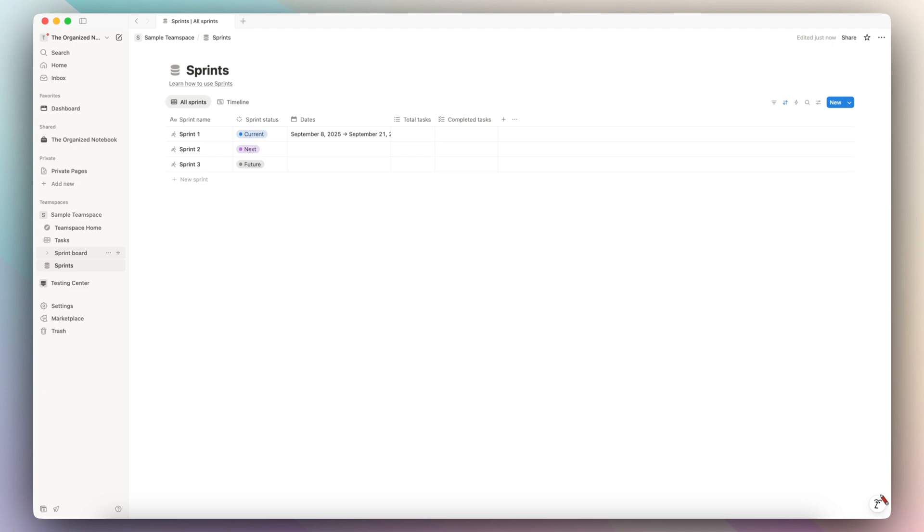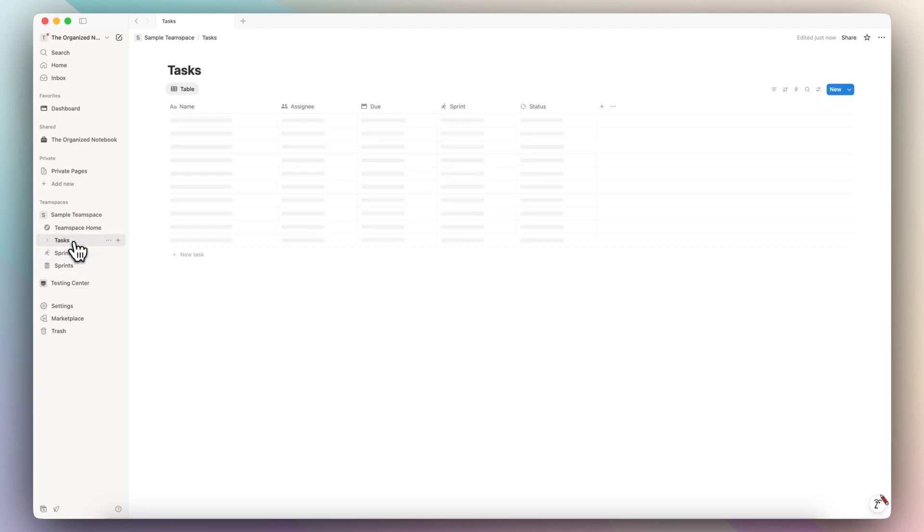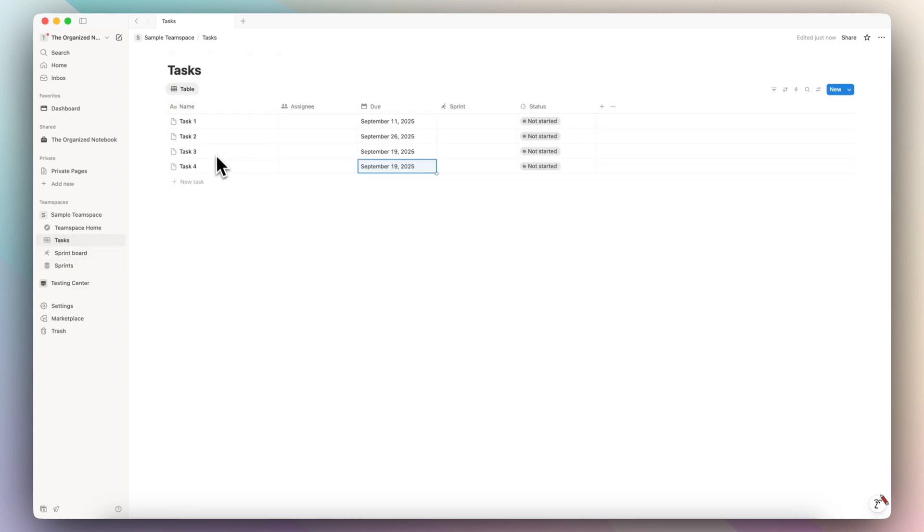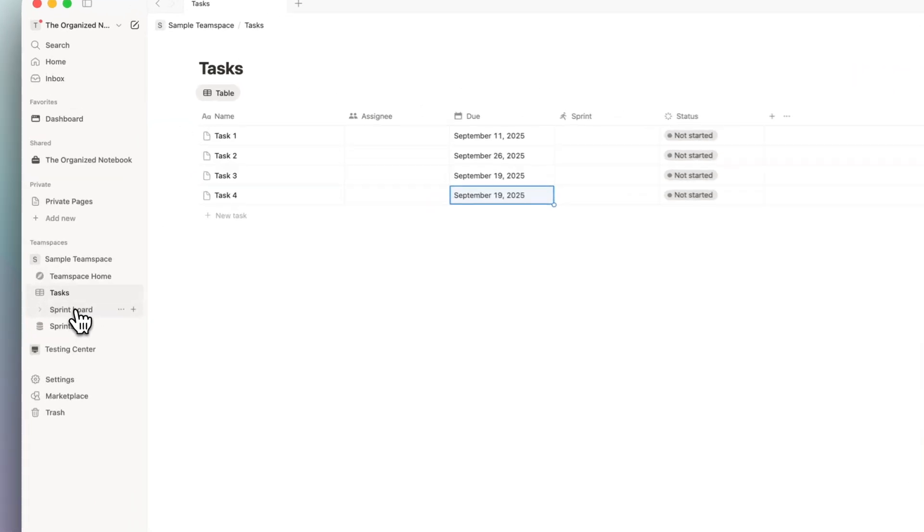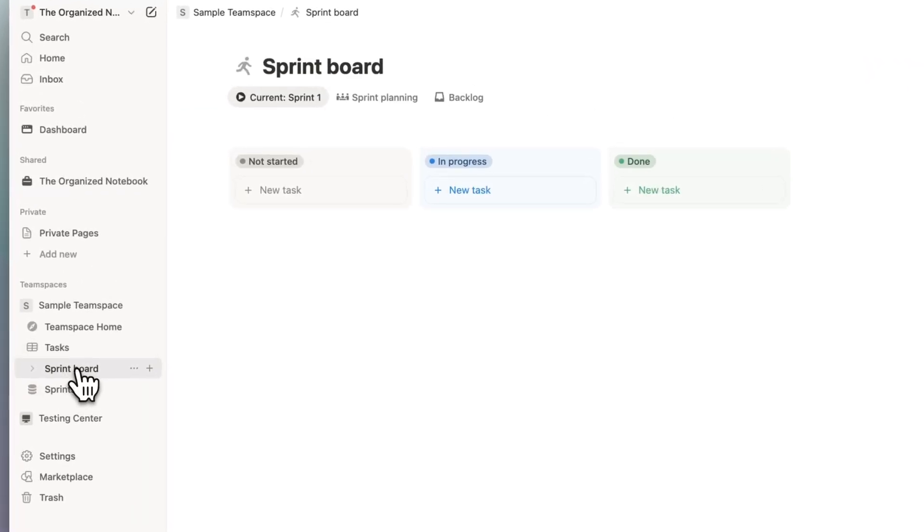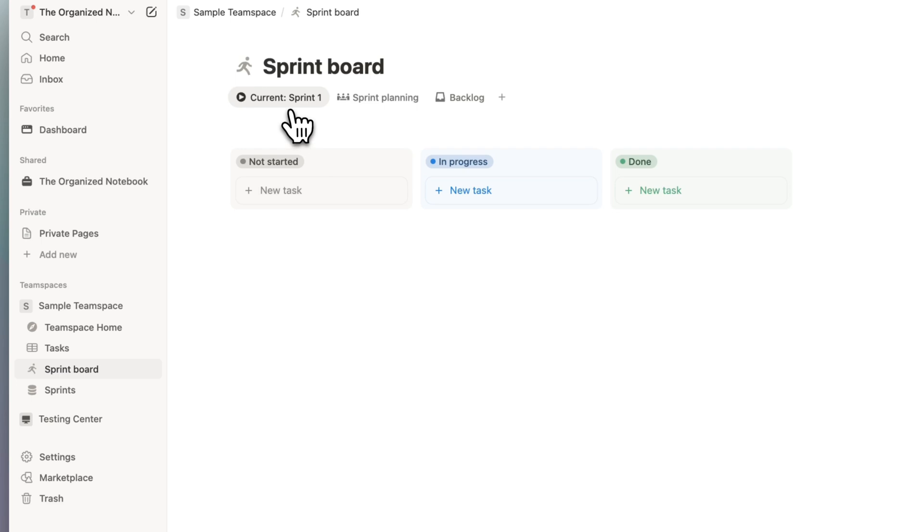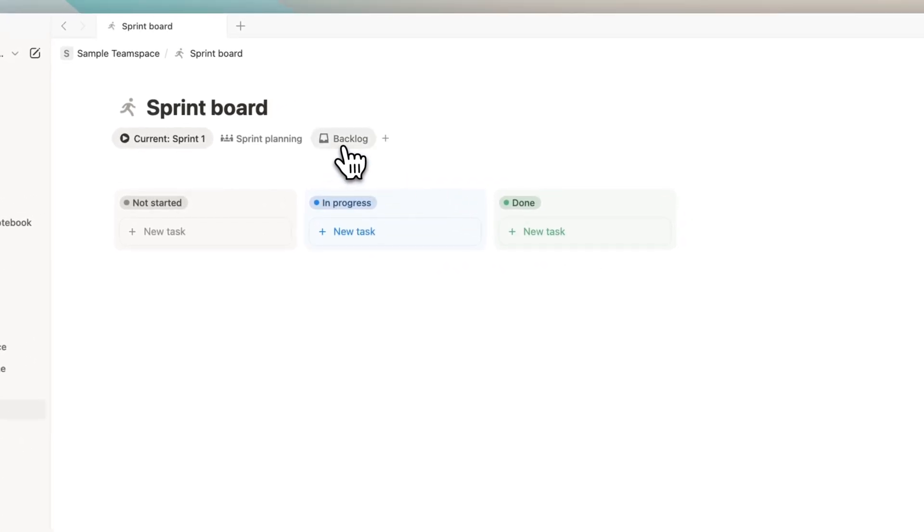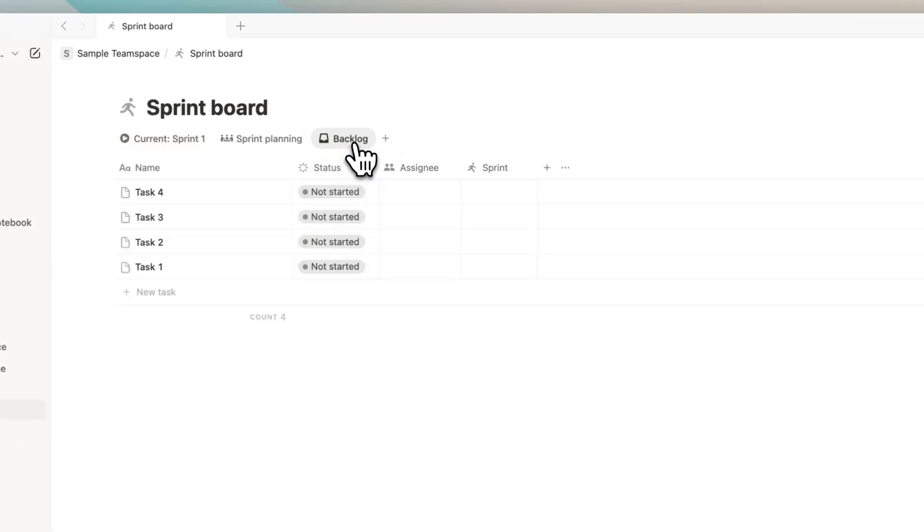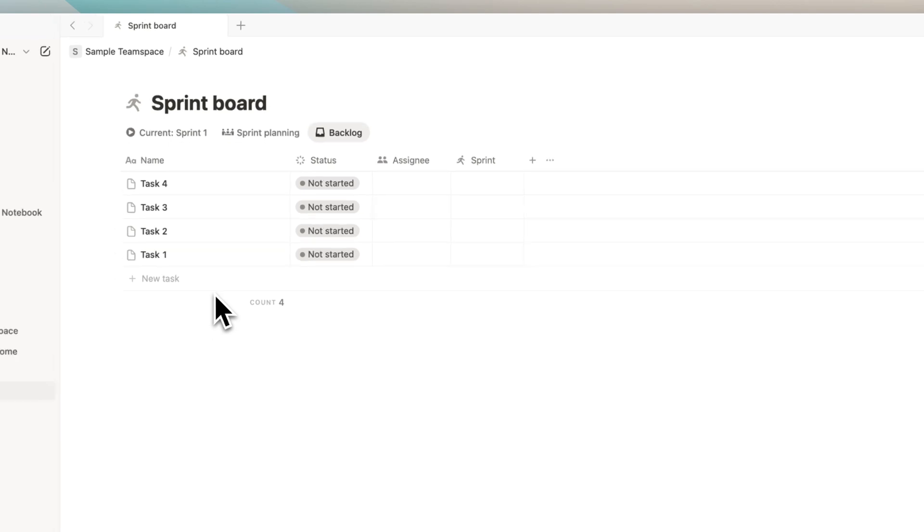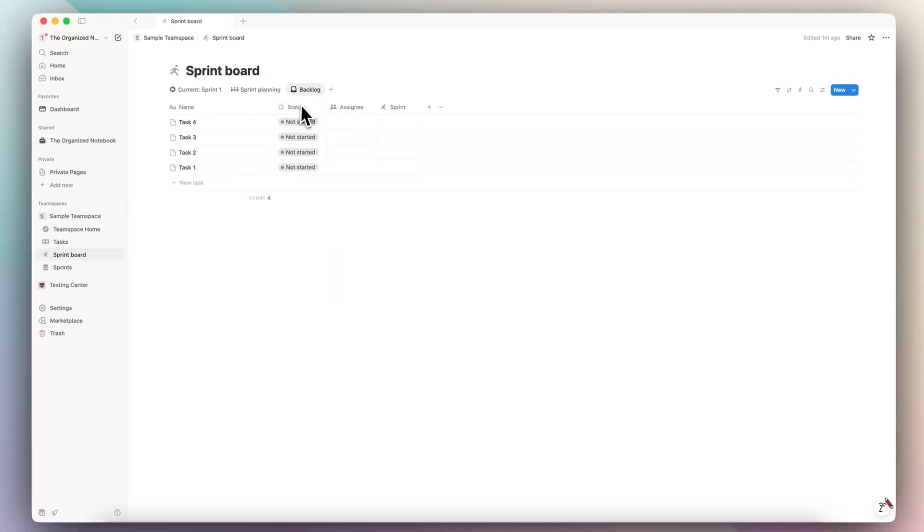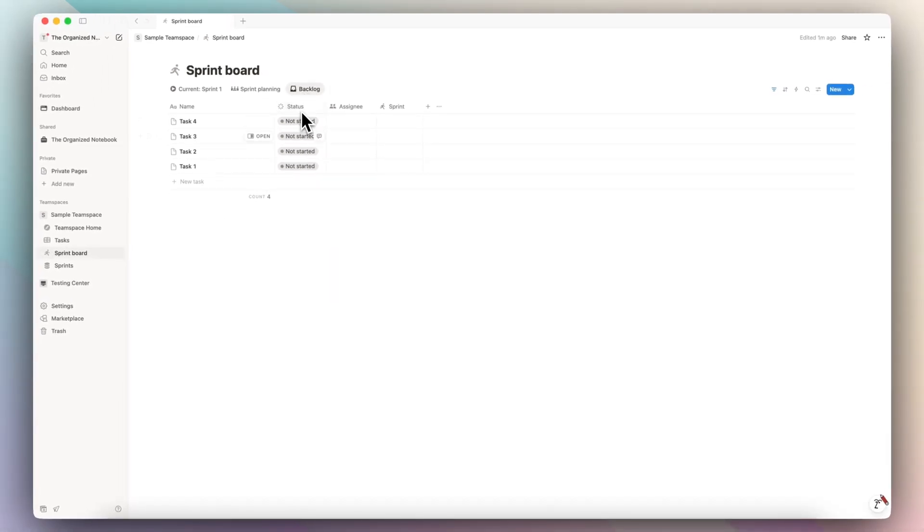So just to explain this, I'm going to add some sample tasks inside my task list. Now let's say that I have these four tasks. If I go over to my sprint board, right now I'm on sprint one and there are no tasks inside here. But if I click my backlog, I'm going to see all of my tasks here. The backlog is basically showing all tasks that haven't been assigned any sprints.